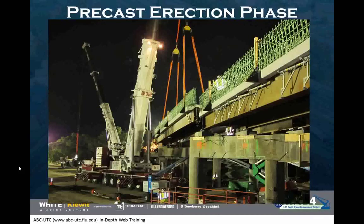This was done to minimize the crane moves, because each crane took an average of 2 hours just to move one of these large hydraulic cranes. You had to take the counterweight off, you had to have a place to store it, and then you would have to move your crane and then rebuild your crane all over. And to avoid that, we engineered our picks pretty tight.